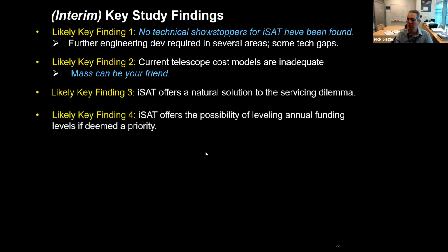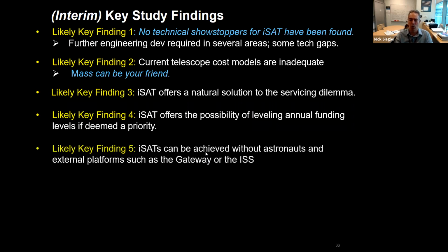Now, fortunately, you guys don't have to worry about funding levels at this level, but we have heard from the NASA Management Office that they certainly care about cash flow. In fact, they care more about cash flow per year than total dollars. So if that's a game that is interesting, in-space assembly, because of its very clear definition of modules, allows you to really define and lock down how much money you actually need per year. And since things are not waiting on each other, you can actually get away with that and spend less per year, although you might spend more in the long term.